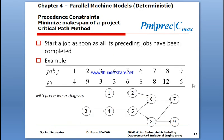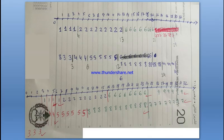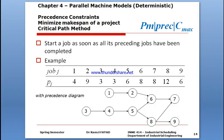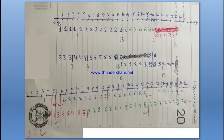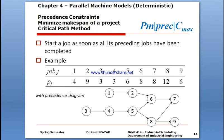We have nine jobs with given processing times and precedence requirements as shown. I put a time scale from zero up to around 240 units. We can have as many parallel machines working together at the same time, but we have to satisfy the precedence diagram. For example, step one and step three are parallel, and step two and step four are parallel, so they can be performed at the same time.